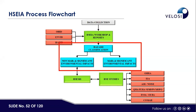Q&A: When is EIA required and when is HSEIA required? EIA is normally a part of HSEIA. To cover all overall aspects — health, safety, and environmental — we carry out HSEIA, and EIA is a part of HSEIA. It is required at every phase of the project: Phase 1 (concept and FEED), Phase 2 (EPC), Phase 3 (operation), and Phase 4 (demolition or decommissioning). HSEIA must be developed in Phase 1, updated in Phase 2, updated again in Phase 3, and a decommissioning HSEIA must be carried out if the project requires demolition or decommissioning.